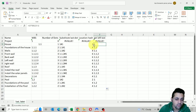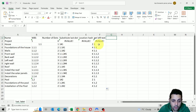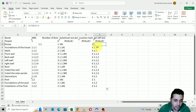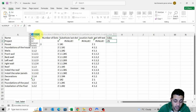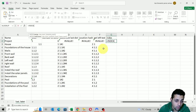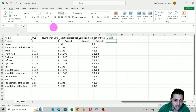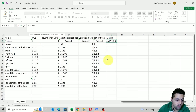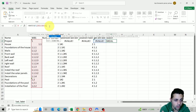This is not yet what I want — instead of getting '1', I'd like to get the phrase 'house', and for the foundations of the house whose parent is the house, I want the word 'house'. So we're going to create a new column called 'Index'. We use the MATCH formula, which tells me the location in the rows of the value I'm looking for. The value we're looking for is the parent WBS level, and we search for it in the work breakdown structure level column using dollar symbols to fix those columns, with an exact match. For the next row, it's telling me that the value '1' is located in the first row of this column.